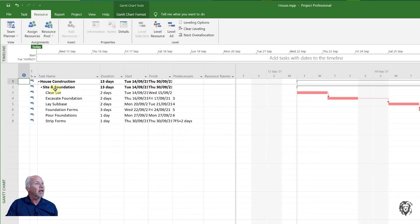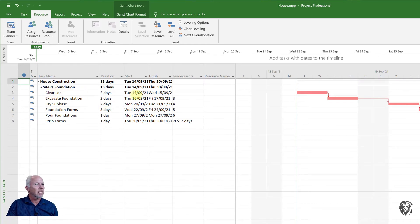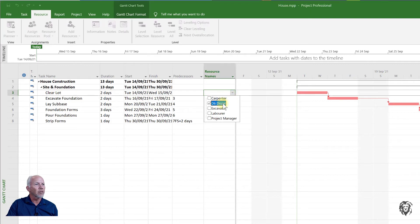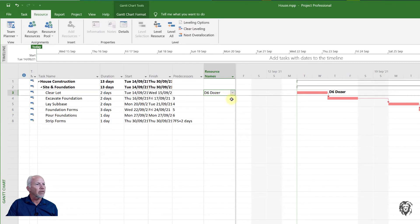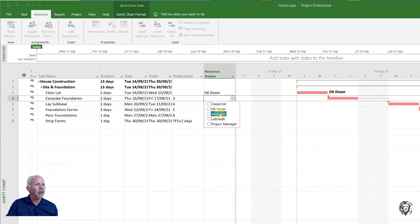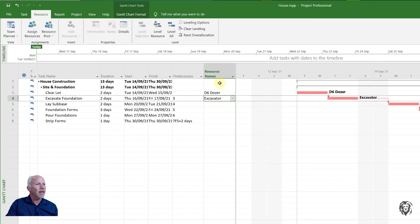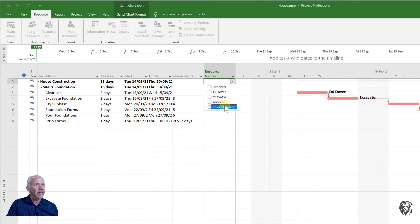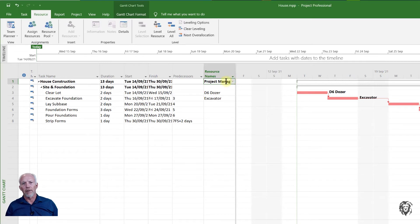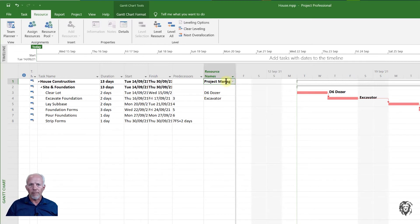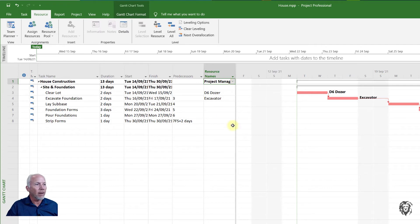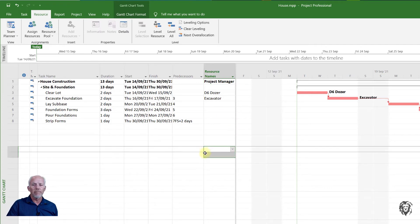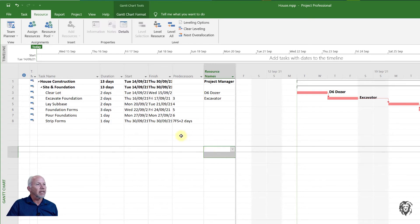Now it gets interesting because we have to start to assign those resources to tasks. I'm going back to my Gantt chart. For clear the lot, let's assign the bulldozer to that. For excavate foundation we'll do that with our excavator and maybe we'll use the project manager to manage the project. I'm not going to get fussy about 50% of the time or 20% of the time.